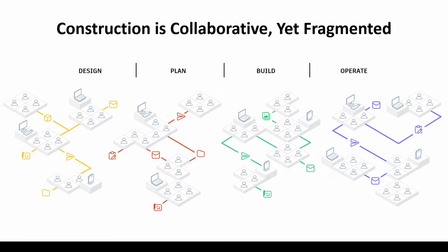What this in turn does is it doesn't help where we communicate our information. So let's say one person communicates a drawing by email. They then communicate further information by using a file sharing site. They may go on site for a site meeting, for example, and share a hard copy of the drawing. This drawing could be shared multiple times, but also at different revisions. This in turn could cause a problem because someone doesn't have the correct data, so not allowing us to work to the right, most up-to-date information, causing problems with the industry.